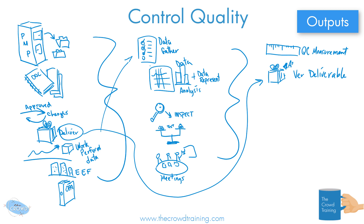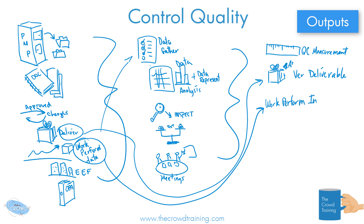Here we had the work performance data, but as it's gone through our thinking, analysis, and gathering, we now have it not as just raw data but in some format of information. So I'll just say 'info' — maybe it's a nice little chart or presentation we've made. Also, sometimes, whether it's approved changes that have come through and we find out that doesn't work, or as we inspect things, we've got to change things — this is where we make those requests for change. And it will go through the change control procedures in the perform integrated change control process.